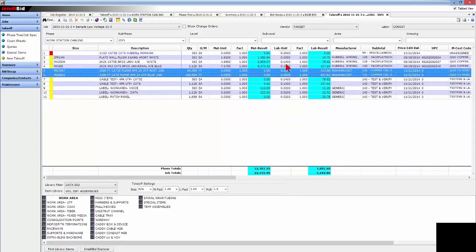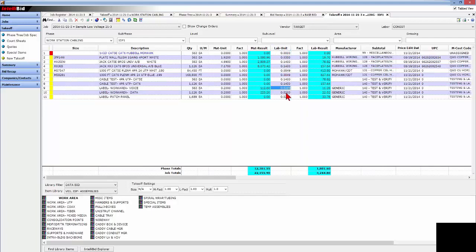And our labor units, even though, albeit a standard, users can create their own standard in the database, but this is a guide to start with. But we use a factor column instead of erasing the line on the labor standard. Keep the standard intact and let the estimator identify how far above or below from the standard the project is in terms of the difficulty.